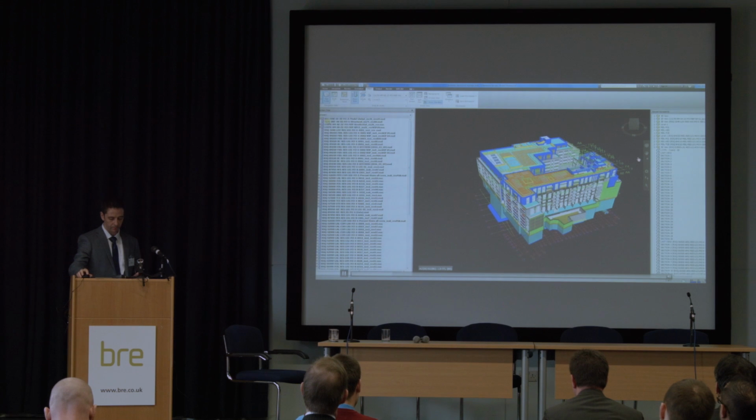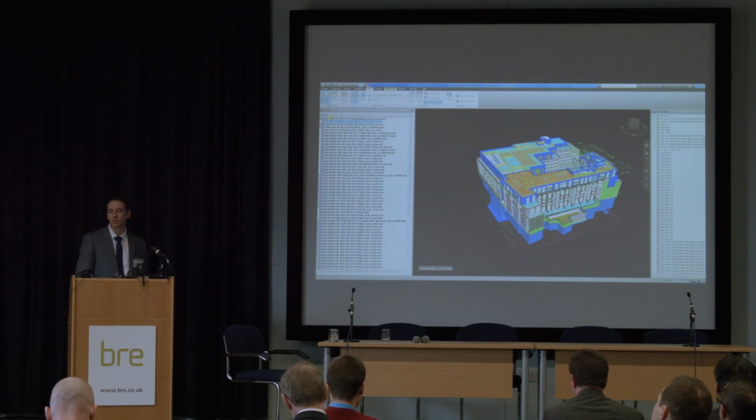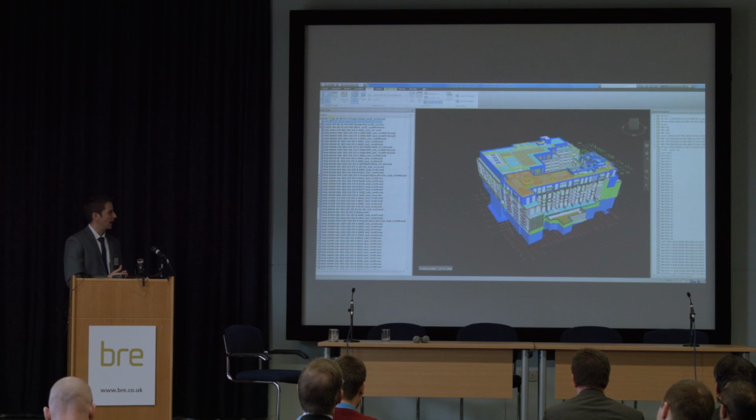I've taken some videos of the models. Unfortunately, I couldn't use live models because the tech here doesn't quite allow it. But what I want to show you here is basically one of the federated models. There are over 600 models on this project, and that's not that there are 600 members of the supply chain, it's just how the models are split up. Each of the supply chain members is probably delivering anywhere between 10 and 50 individual models, because it's split up by floors, by zones, and by packages. So you end up with about 600.